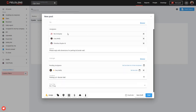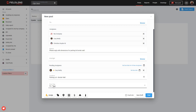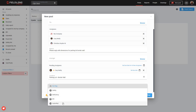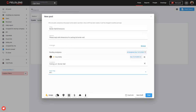So now we have a list of folks who can see this post, we have details about what we need, we have individuals assigned to take action, and a location within the work site. Then we have the ability to create a post flag, which allows me to tag the type of post that I'm creating. No flag simply means a miscellaneous post on this project, but I have four other options: I can pick a flag for this post — is it a safety issue, a deficiency (also known as a punch list item), an RFI, or a submittal request? I'm going to call this an RFI — I'm asking for information, so this would be a request for information from my subcontractor.